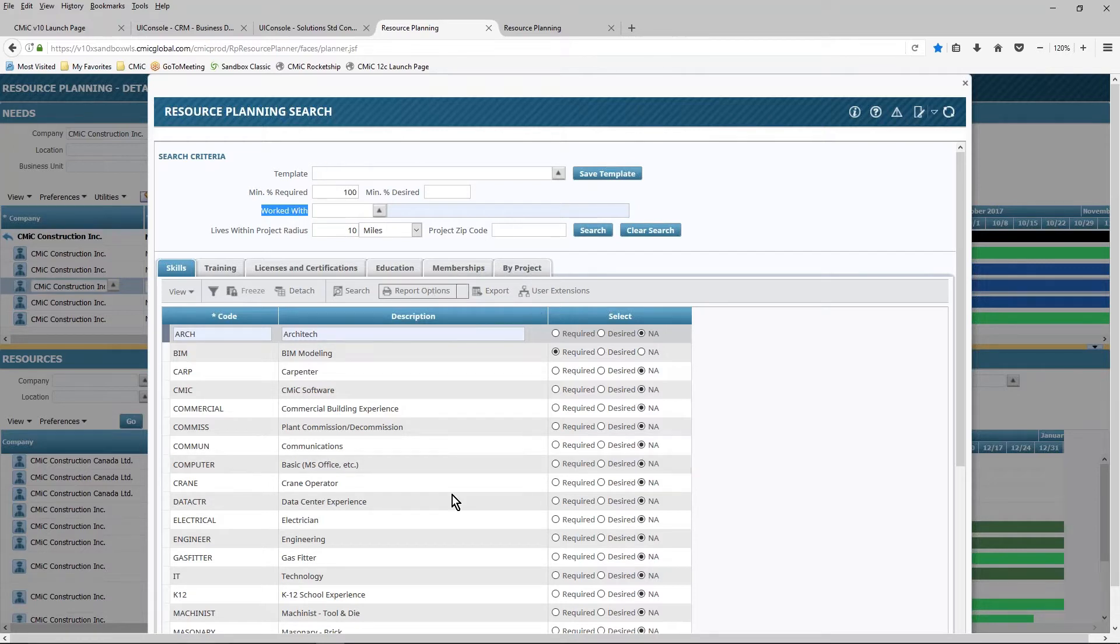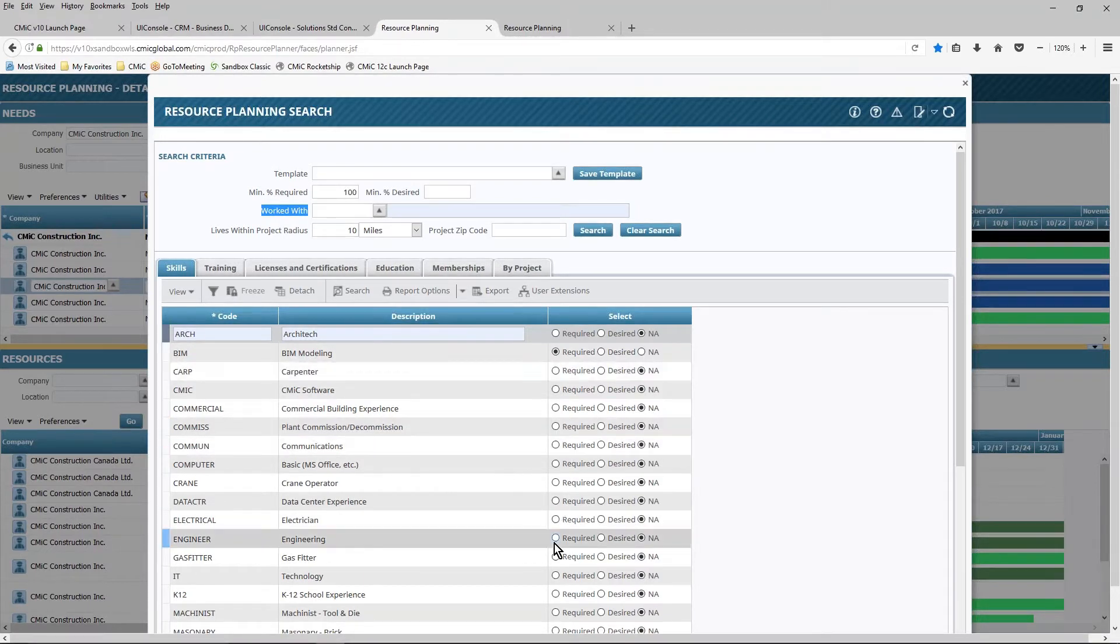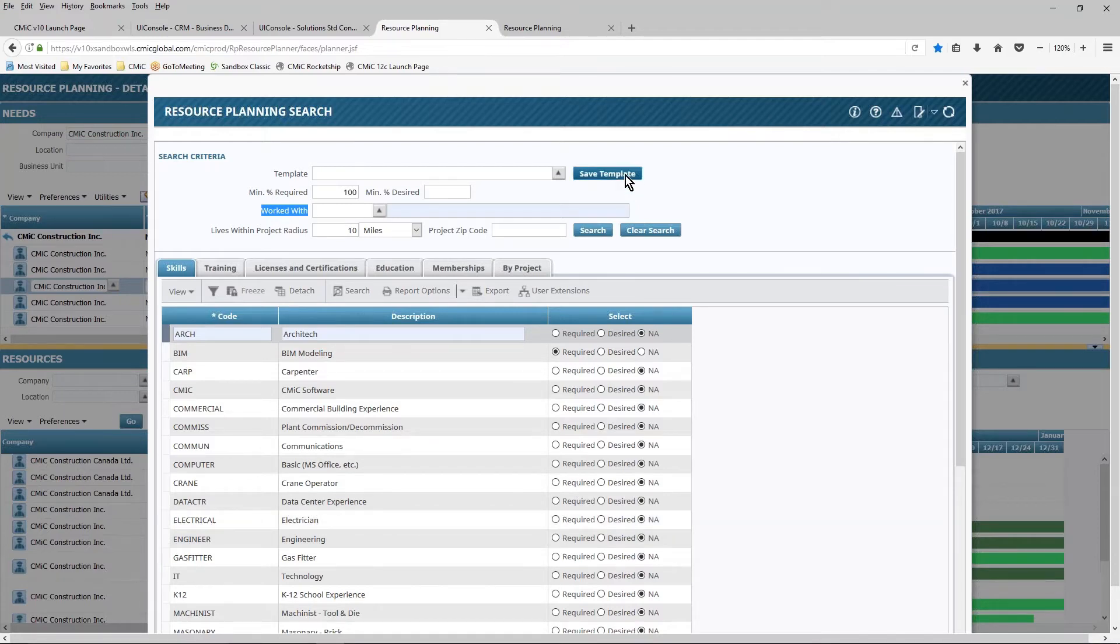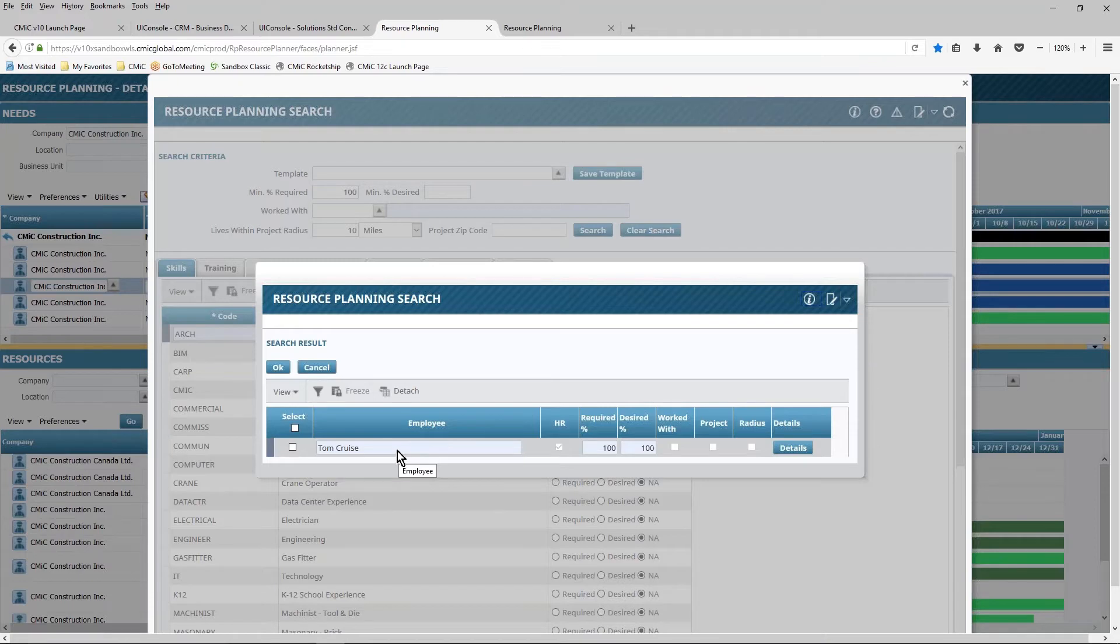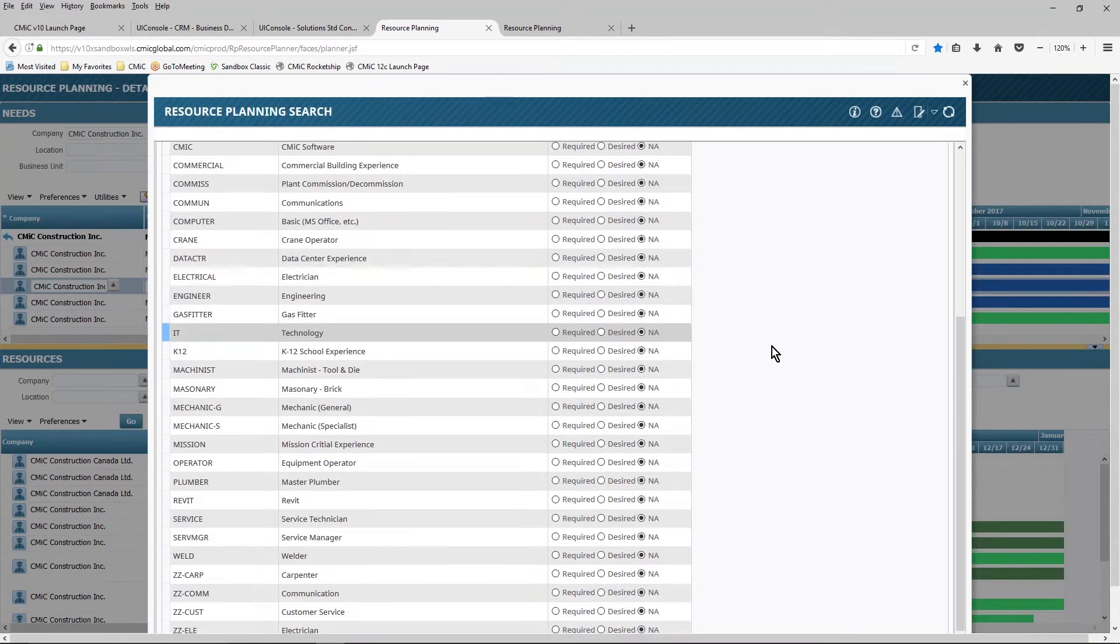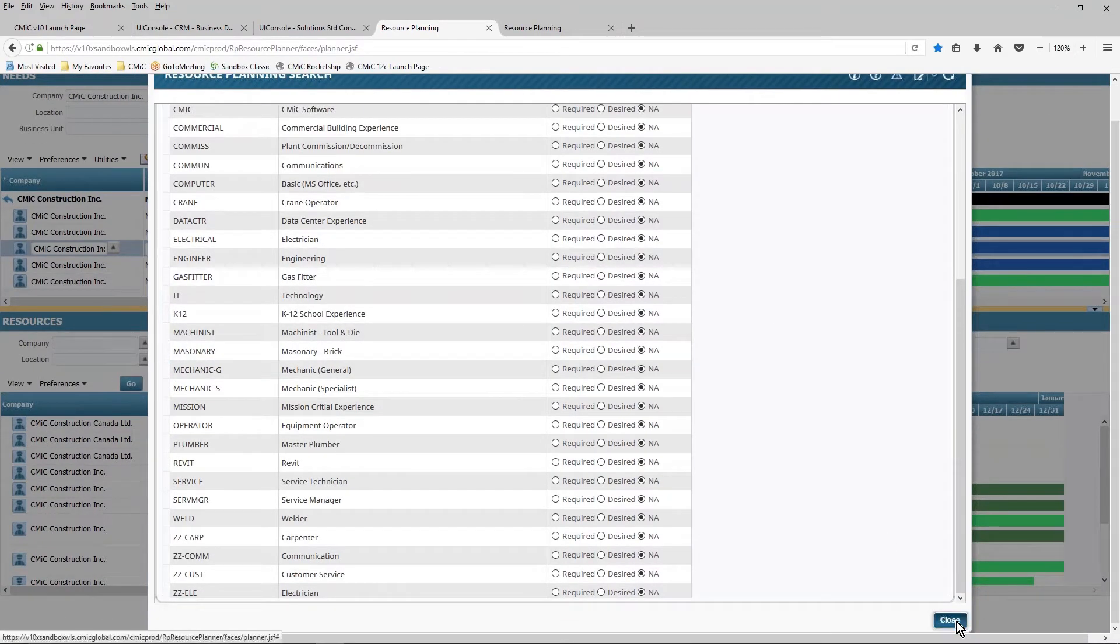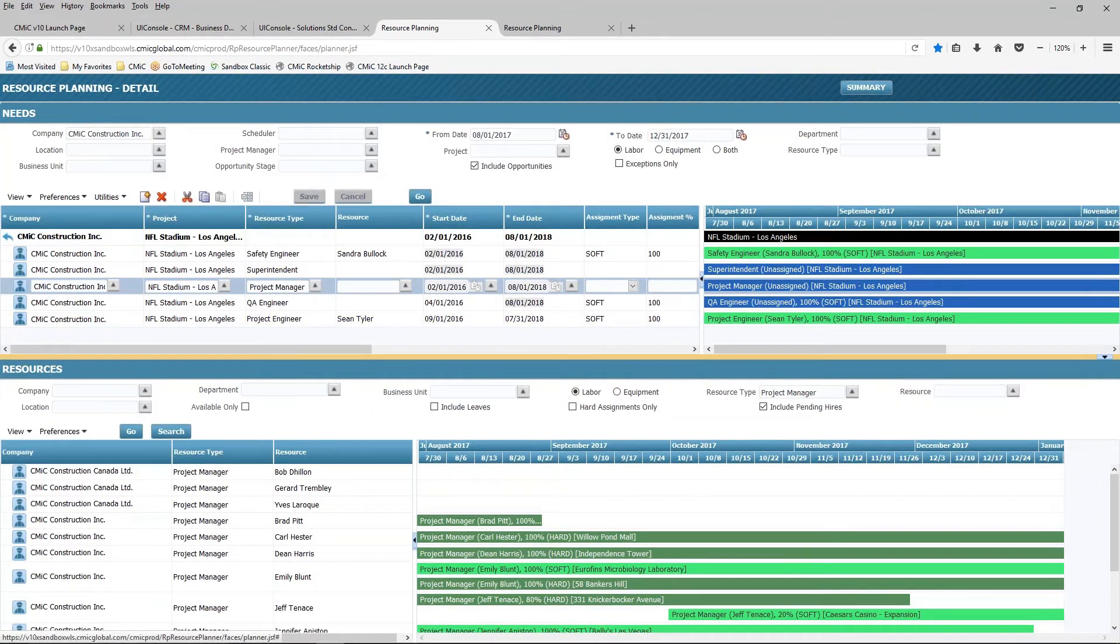All of these criteria that you see here, a lot of them are attached to the employee record in payroll, and I have the ability to go ahead, make my selections, and once again, if this is a repeatable exercise that you're doing, I can save that as a template. But then I can go ahead and hit the search button, and that will then give me a list of all of the project managers available, but the ones that only match the particular set of skills or criteria that I've selected on this particular search. And then having done that, I have the ability to make my selection and drop that individual into this particular requirement.